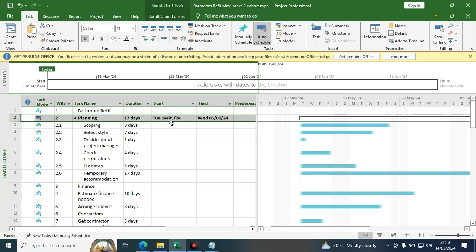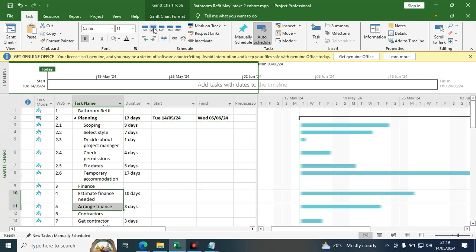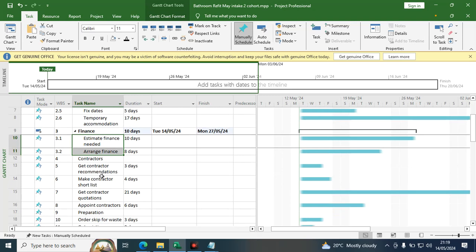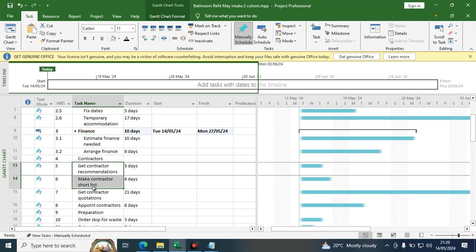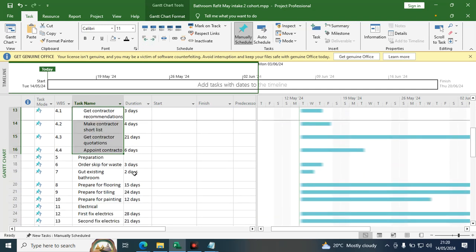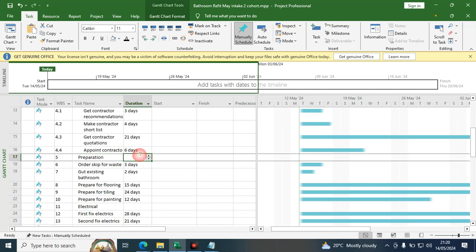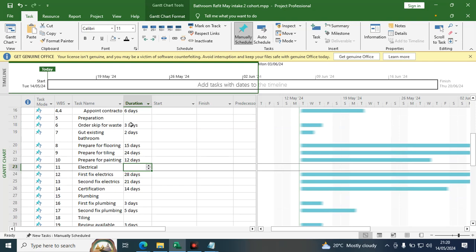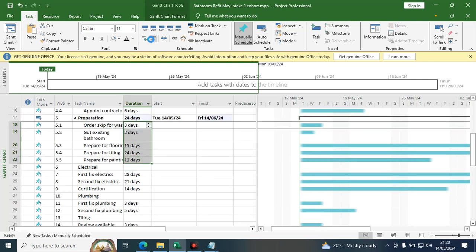So what are we supposed to do next? We are supposed also to separate the rest so that we can remain with the major phases. So under the contractors, up to where we have contractors, we indent. You can see that we are now separating the major activities from minor activities. Remember, I'm guided by the duration column. Where we have a blank in the duration column, it simply tells me that that is a phase, up to where we have another blank. So I'll simply select this and I will hit my indenting arrow.